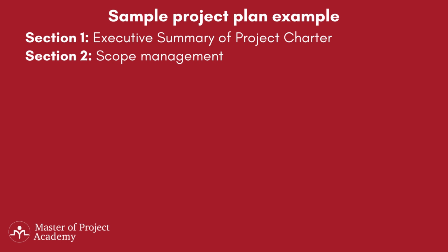Work breakdown structure includes defined work packages and sub-work packages and their associated breakdown sub-levels. Deployment plan. Let's say that the project involves deploying an application to state health partners. This section would discuss the approach for rolling out the application to the end users, including conducting environmental assessments, developing memorandums of understanding, hardware-software installation, and data conversion.